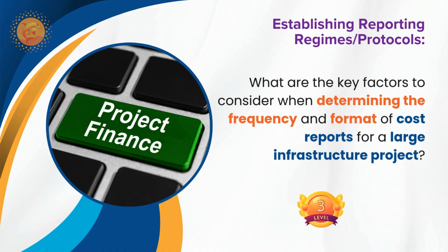But when it comes to infrastructure, the risk level is higher, and most probably there are unknown site conditions and redesign requirements, and method-related things need to be observed. Everything contributes to the risk profile. So that risk profile will be there, and you will make sure how you are managing the risk, including the contingency, because contingency is there for you to manage the risk. So it is related.